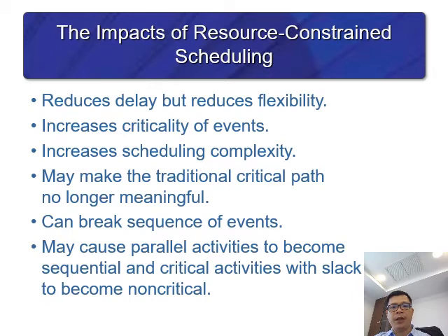It may make the traditional critical path no longer meaningful, which means that when we utilize the resource effectively, it can break the sequence of events and may cause parallel activity to become sequential and critical activity with slack to become non-critical.